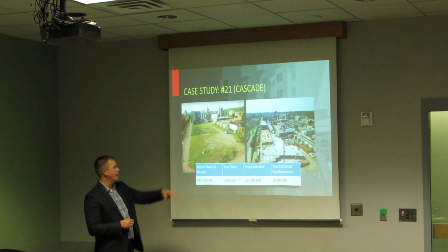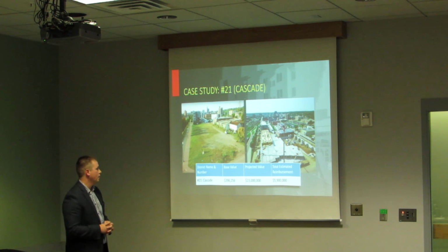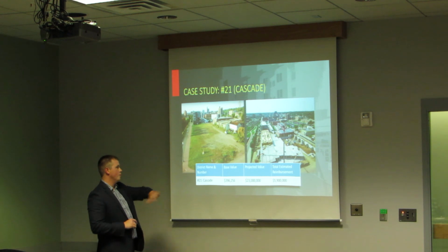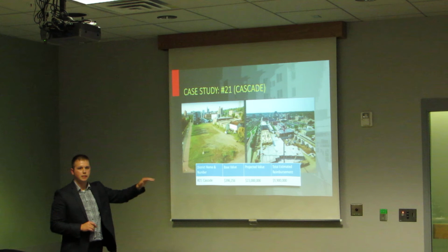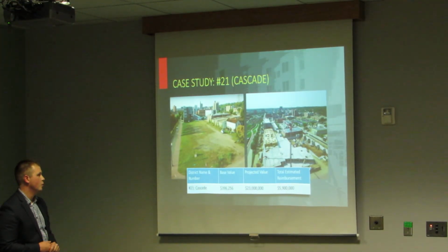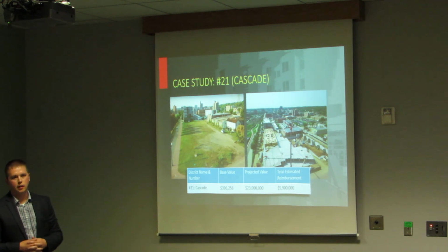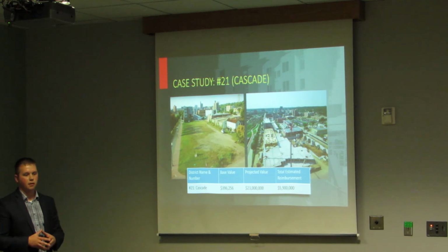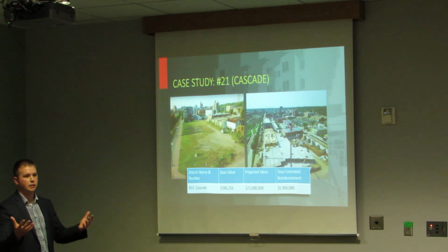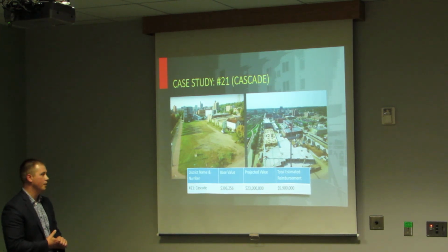But as you can see on the right-hand side, you can start to see this development is underway here in Sioux Falls. So it's not completed yet. What it entailed, they removed that whole 2.5 acre site, had underground parking underneath it. They had to remove all the dirt. They actually had to go deeper than what the basement of the garage was, just because of the amount of contamination and some of the requirements of the DENR as they looked at the level of contamination. So they actually had to dig it down and build it back up a little bit.